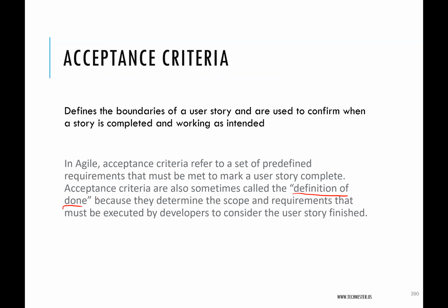But sometimes there are more things involved outside the story. And those things will go into your definition of done. It may be, okay, after you have implemented all the user stories, and you have done them well, so we have accepted each of them, you still need to organize them in a certain way, right?